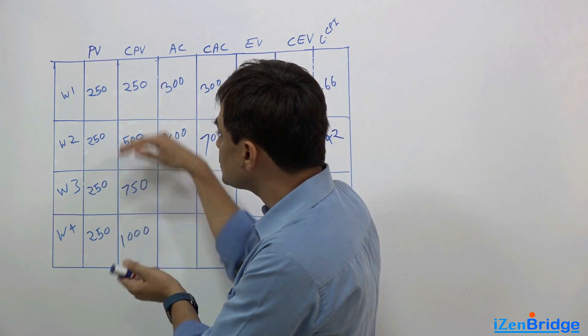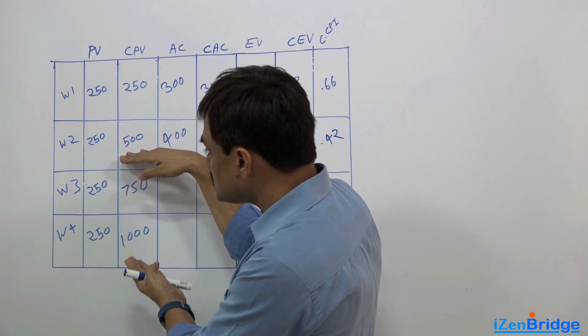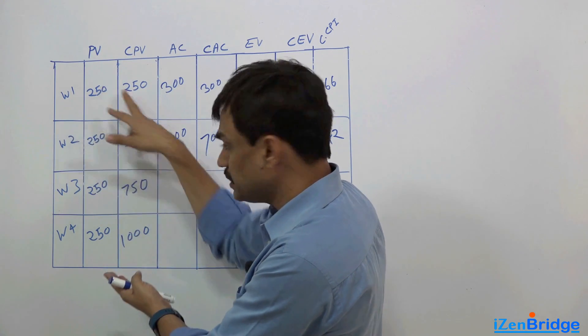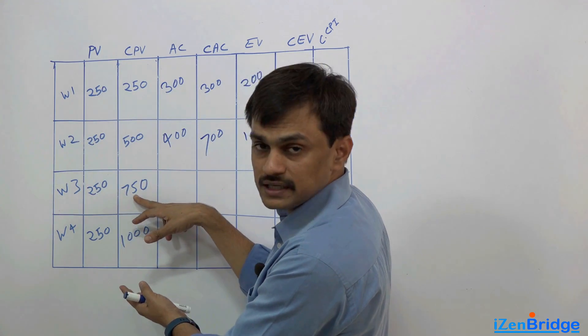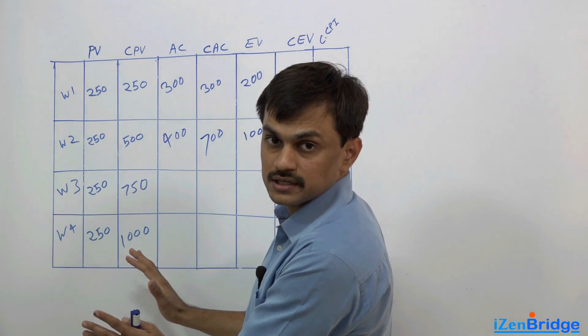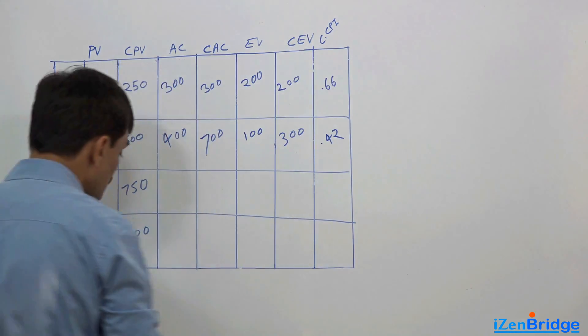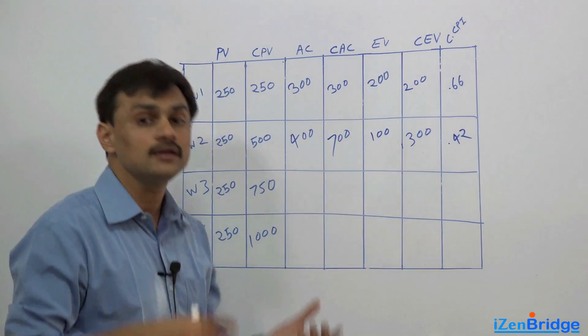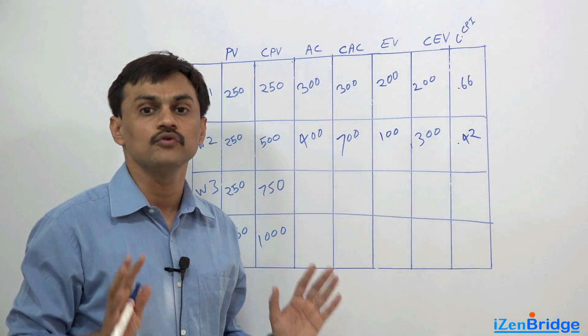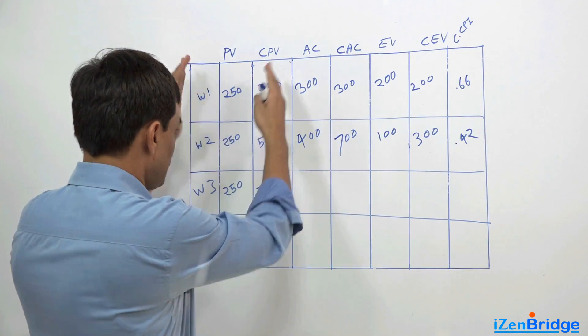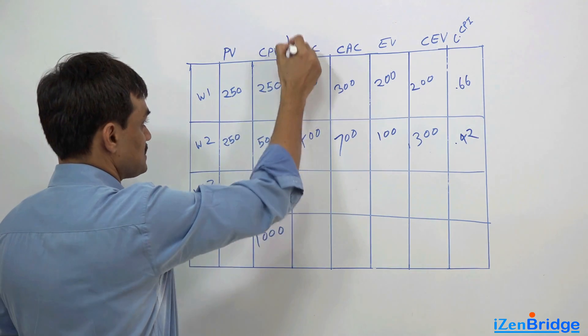Our planned value is $250 per week which makes the whole work $1000. So our cumulative planned value week on week is: first week $250, second week $500, third week $750, and the fourth week is $1000. So we are planning to spend $1000 and we are planning to earn $1000 by the end of 4 weeks.